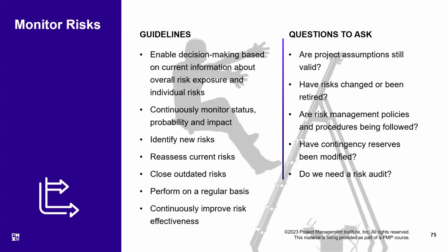And those risks which did not occur are closed out because they are no more an issue. They are no more a problem for us. So we will close out those risks. For example, yesterday we were constructing something where rain could have bothered us, but it did not rain. That means that risk did not occur, and ultimately we have to close it out.